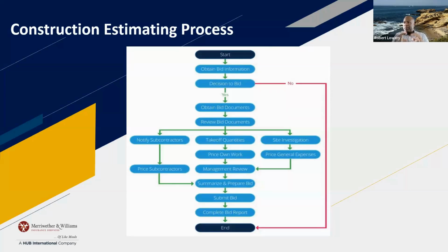And so you put your estimate together, your bid, and at this point it's a bid package that you have put together with all the documents and signatures, and then you need to know when it is due. Do not wait until 15 minutes before it's due, because something could happen if it's got to be uploaded. Maybe 1 hour before. If it's got to be submitted in person, make sure that you have somebody there early. And if you're still working on the bid, you can drive it there, or whatever it is, plan accordingly. If you're a day early with it, which is great.